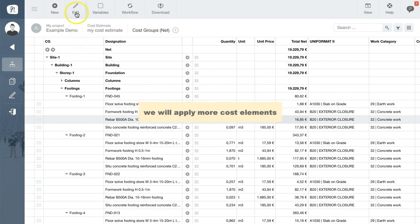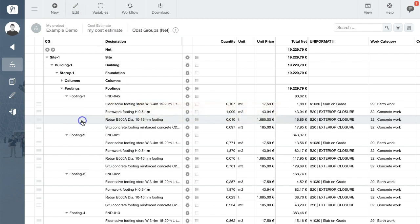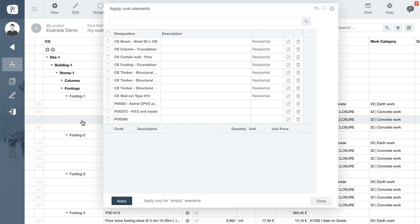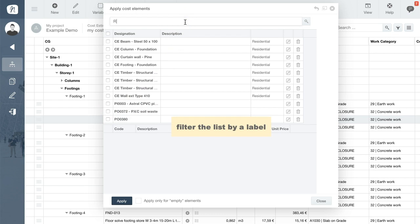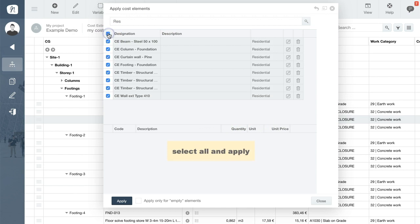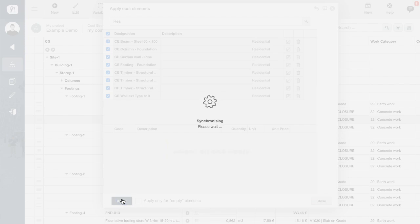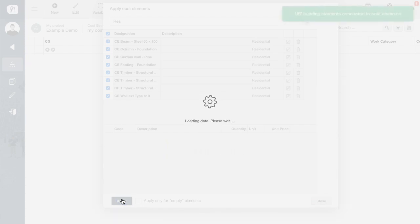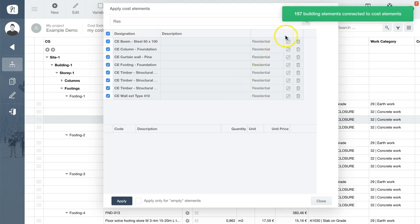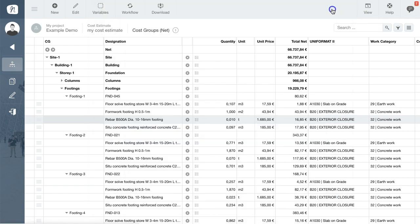Let's apply some more cost elements. This time we will filter the list of cost elements to identify those applicable to residential projects, select all of them and apply them. Again, NOVA is searching the model for any building components corresponding to the selected cost elements, and it will assign and connect the work items and calculate the quantities and costs.